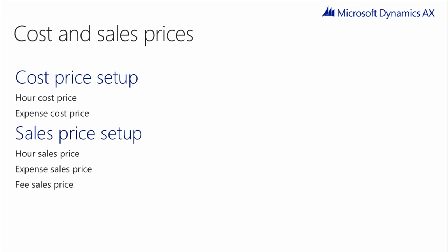If a customer will be invoiced for transactions, the sales price is specified either per unit, as a markup percentage of cost price plus a flat amount, or contribution margin ratio. Sales prices are really only used in time and materials projects. In fixed price projects, sales prices are ignored, and the contract price determines the revenue that the project earns.